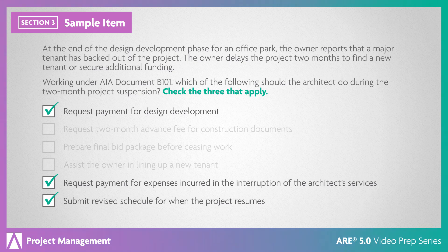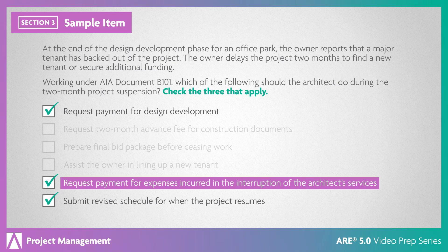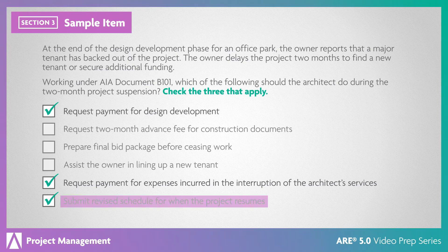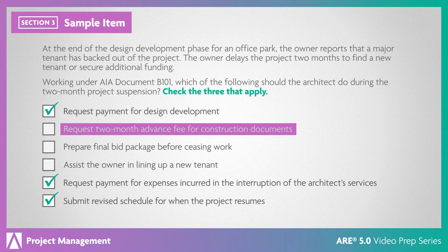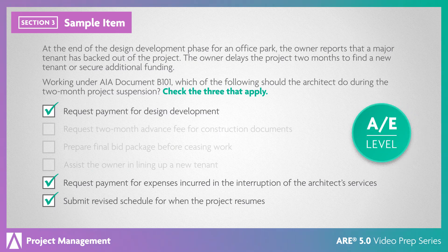According to AIA Document B-101, if the owner suspends a project, the architect is entitled to payment for all expenses incurred up to that point. The architect can also request payment for expenses incurred because of the interruption. And if the project resumes, a revised schedule can be submitted. When an owner suspends a project, the architect should suspend work on the project, so requesting an advance or completing other work is unwise. While assisting the owner in lining up a tenant may get the project back on track, it is beyond the scope of a standard owner-architect relationship and is not the role of the architect. This is an AE-level item because it expects you to understand this contract and how the delay results in both a suspension of work and consequences for both parties.